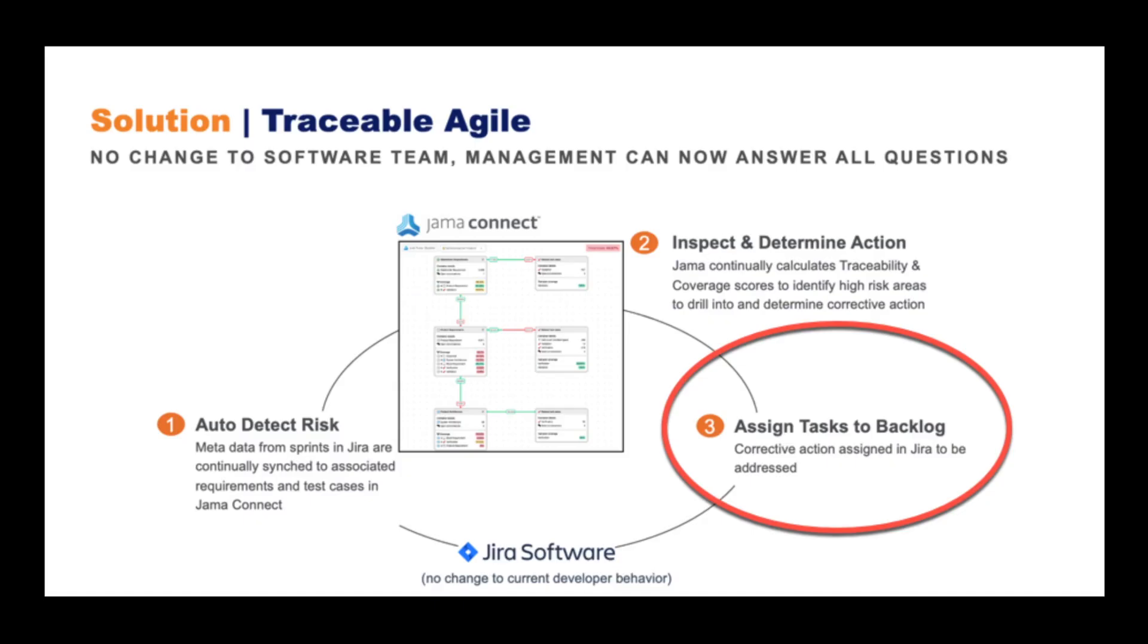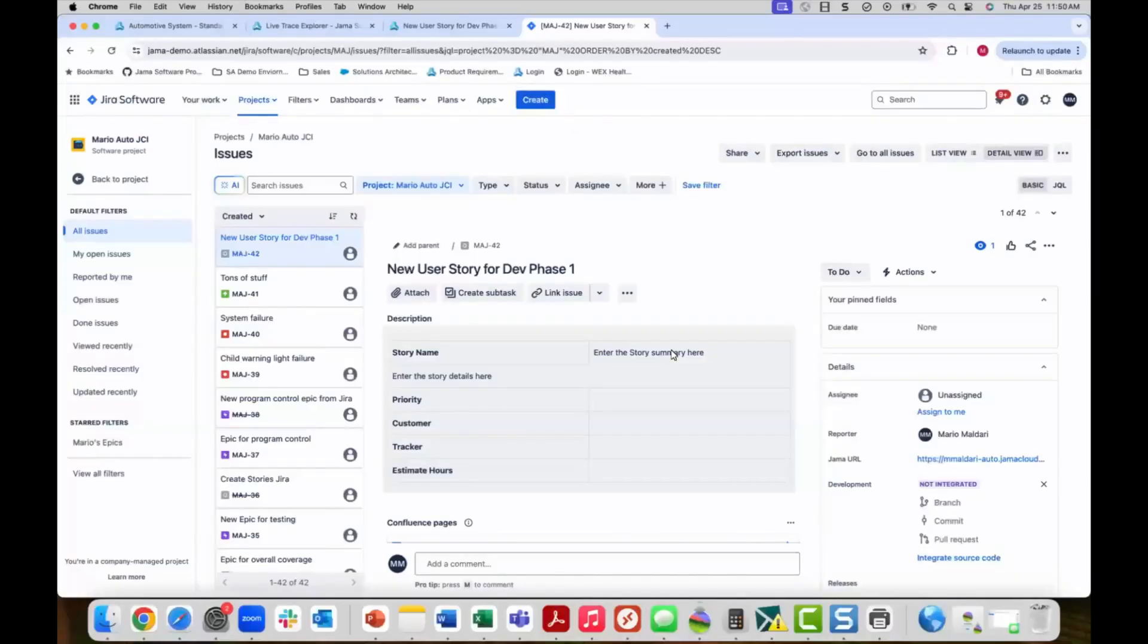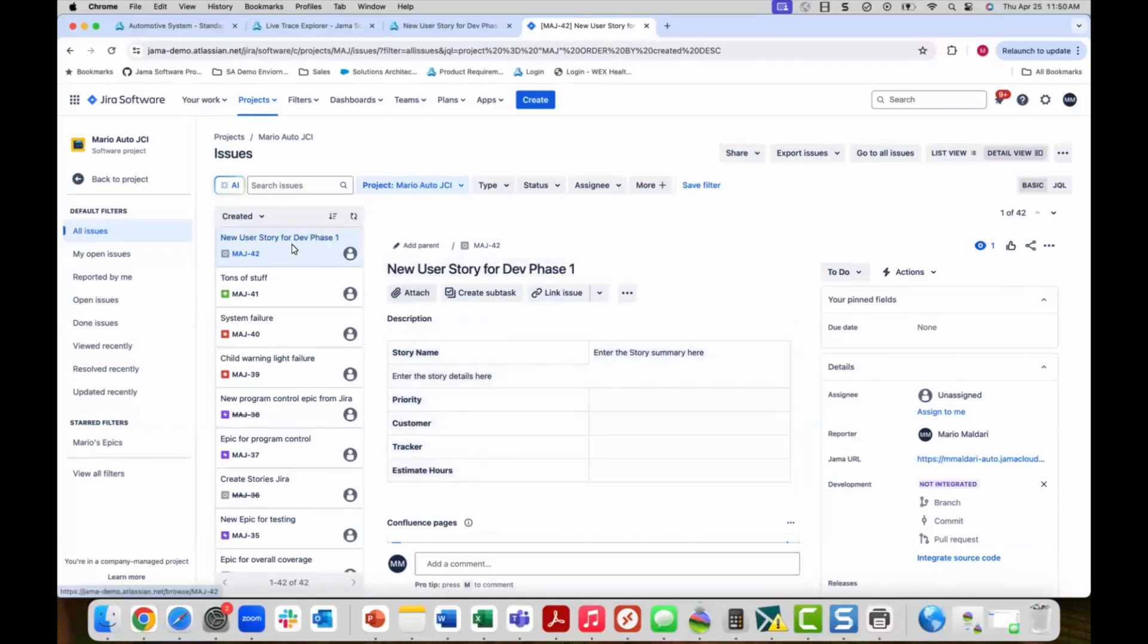Step three in traceable agile is for developers to take action as a normal flow in their backlog of activity. Let's go into Jira and see how the added user story shows up in a developer's queue of activity. A developer working in Jira sees that this new user story has come into their queue and they can begin to further define it.